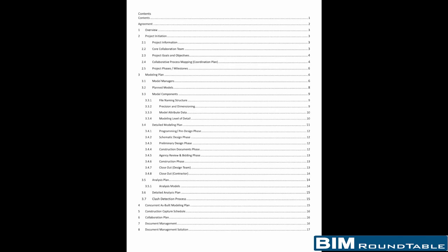It's very useful to have a conversation with the subs. We've worked with Cleveland before, and they are using Revit all throughout. They put together their packages and everything using Revit objects, families. And unfortunately, when people have a meeting to start fleshing out the BIM execution plan, they are not bringing the subs along. There's a lot to be determined and time saved by having those conversations early.